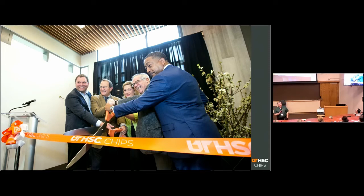For us, part of the process was that this is a state appropriated building, and so it couldn't be managed by us here in Memphis, who actually know what's going on and understand simulation. It had to be managed out of our system office, which is in Knoxville. They know nothing. They're great at building dorms. They don't know anything about building a simulation building, and so that caused a lot of delay.